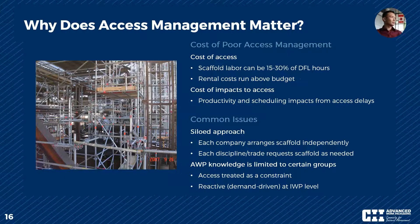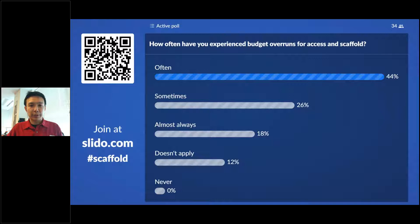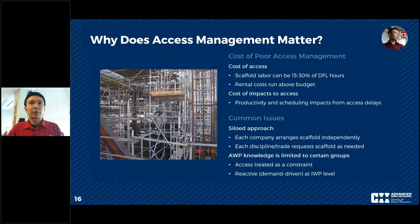From the Slido results, 44 percent said 'often' and 18 percent said 'almost always' — so over 60 percent of the time, we're seeing cost overruns on access and scaffolding on projects. That underscores the importance of the topic we're discussing.